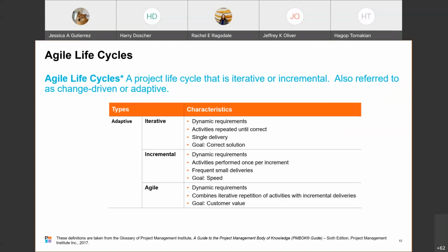You consult with the customer, assess whether or not the changes that you've made over the last iteration have satisfied the customer requirements, or if they haven't, why haven't they? And then you structure your subsequent deliverables based on the assessments. You go through this assessment every sprint, and as I said, ideally every 2 weeks. And what you're really trying to do here is maximize the customer value of what's produced. Give the most back to the customer.